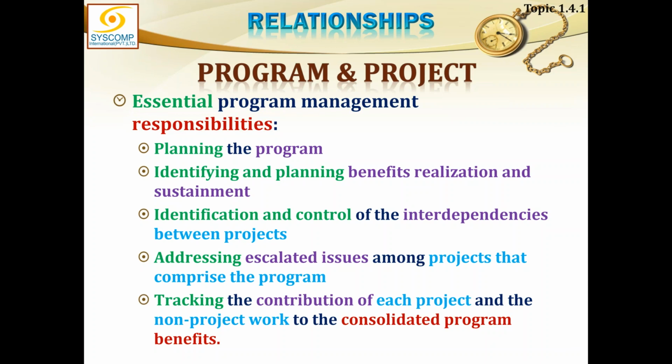Addressing escalated issues. All those issues which could not be resolved by the project will ultimately come to you as a program manager. So for your projects, you are in the escalation path. So you must address all unresolved issues coming from the project to be resolved here. That is where your guidance is required. Tracking the contribution of each project and the non-project work, all components, to the consolidated program benefits.